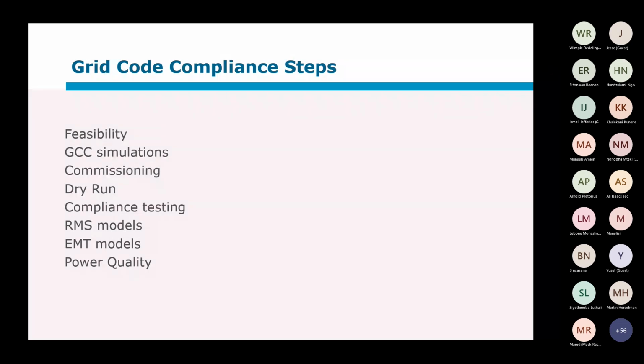Maybe we haven't spoken about the exemption process and the amendment process, but that's in one of the grid codes. I can't remember now what the title is, but there's a process where you approach the grid code secretariat with either a request for an amendment or a request for exemption. Now, in practice, there's a process for a permanent exemption, but I know that there are no permanent exemptions except for some of the old Eskom plant, which was designed and built long before the grid code was written.